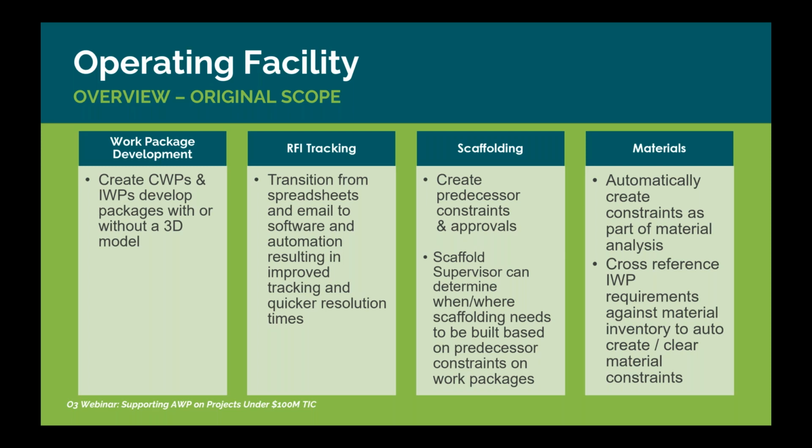in work packaging. Team also needed an easier way to keep track of RFIs, something they were currently chasing using multiple Excel spreadsheets and email. Every project in the facility needed to execute was taking place in an active environment at an operating facility. So coordinating crews and scaffolding was, of course, of utmost importance. They also needed a way to identify when packages were ready for a release and if they had materials they needed for each installation or package.